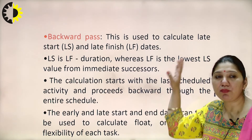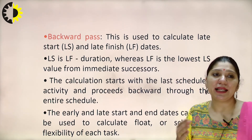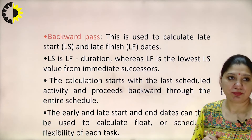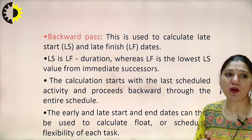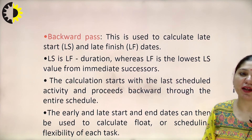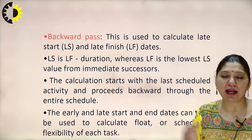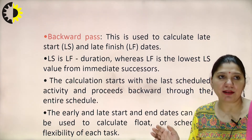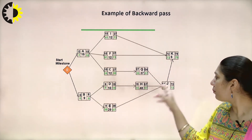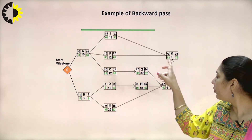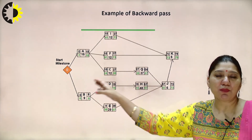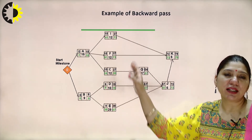Similarly, we have the backward pass, which calculates late start (LS) and late finish (LF) dates. LS equals LF minus duration, and LF is the lowest value from the immediate successor. Calculations start with the last scheduled activity and proceed backwards through the entire schedule. For example, 79 minus 6 equals 73; that 73 flows to the next activity, 73 minus 6 equals 67, continuing back to the start. The backward pass analysis checks for any lags in the project.